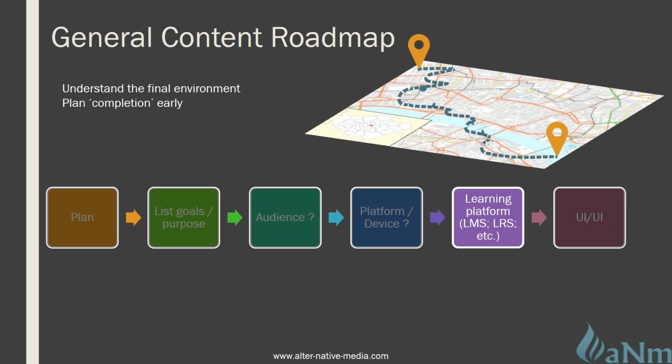So you'll also need to think about learning platforms. Now, we all love, and I put that in specific quotations, we all love our LMS or our LRS. Haha, no we don't. So that's okay. But many of us have to work within the learning management systems, and so we understand that. And with that, of course, sometimes comes testing. You know, if your SCORM package is currently communicating with the LMS, these are things that you'll need to include. Remember, I talked about hedging your bets. In the QA phase, the quality assurance, and specifically in producing for the LMS or the LRS, some testing needs to be done, so make sure you allow time for that.